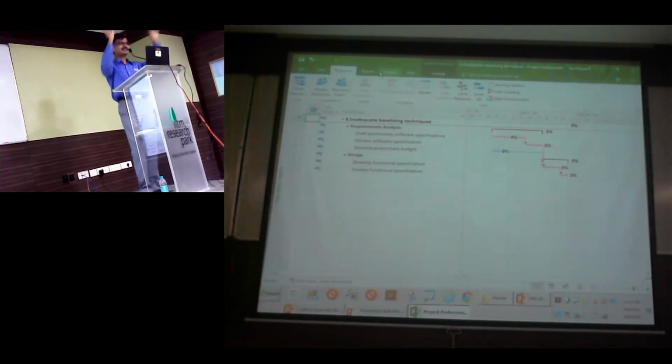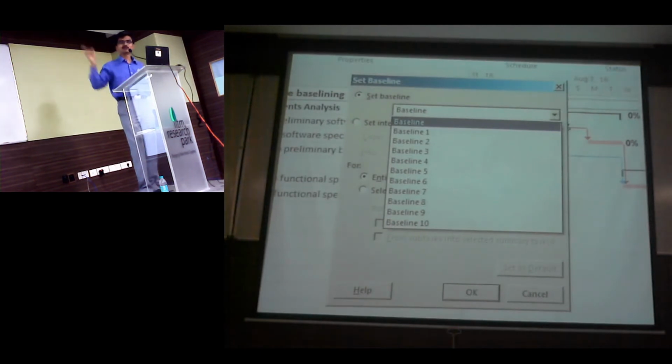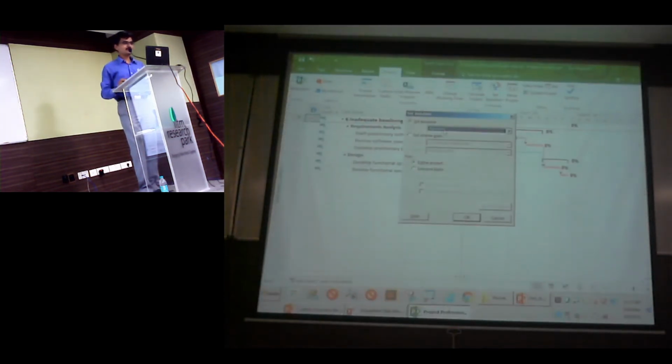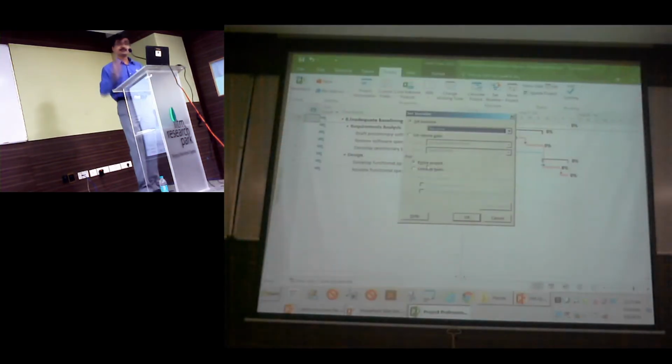It looks like just central baseline. So I go to Project, Set Baseline. You will notice this. This is what I was talking about. So your latest baseline is set in baseline for your entire project. A common belief we have is whatever you see on the screen is baseline. No. When you say baseline entire project, your task, resources, and assignment, all estimates across the 1,000 fields are getting baselined. So your view is not quite important at any point in time.